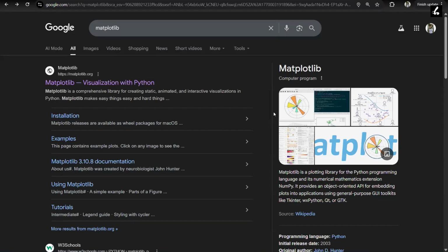So if, for instance, I'm noticing that changes are spending a longer time in QA, I can then say, all right, cool, we have a bottleneck here. What are some of the things that we can do to improve it? And I may start digging into estimates, where we estimated time against completing tasks in QA that are getting hung up, and then suggesting and making some improvements for that area.